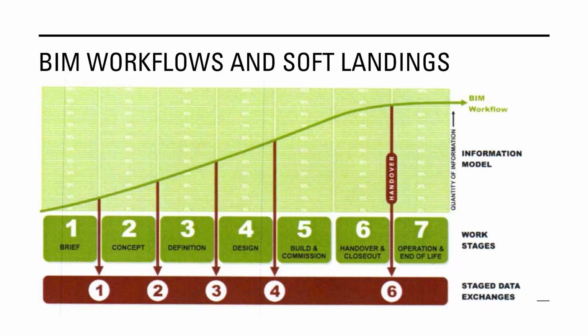Instead of receiving everything at once, they get staged data exchanges aligned with each work phase. This ensures that the operation and maintenance manual becomes a single digital source of truth, accurate, accessible, and tailored to the building's needs. This slide is about continuity, showing how BIM supports not just design and construction, but long-term building performance through structured, intentional data delivery.